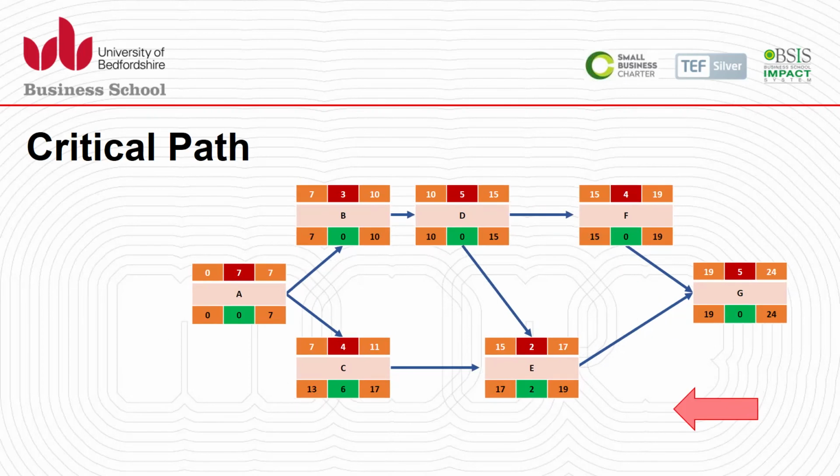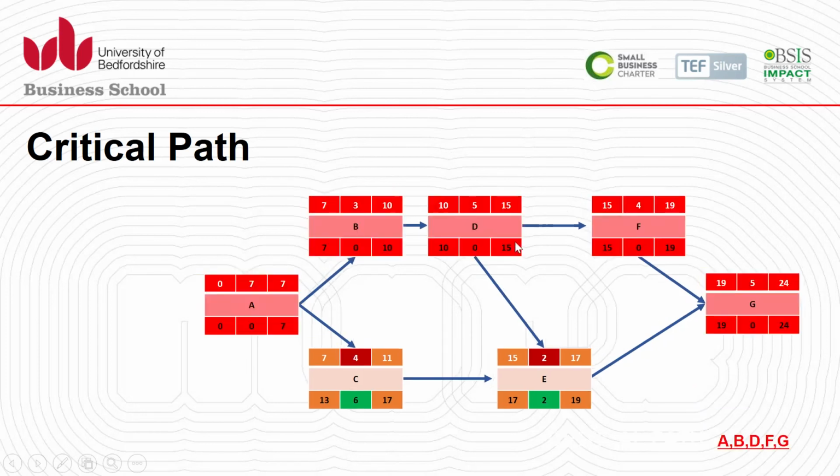When you do this, you get the total duration, and you come backward and find out the activity which has 0 tolerance, and then you identify the path which is critical. Any activity with 0 tolerance is a critical activity. An activity with more than 0 has absorption capacity, and that's a non-critical activity.